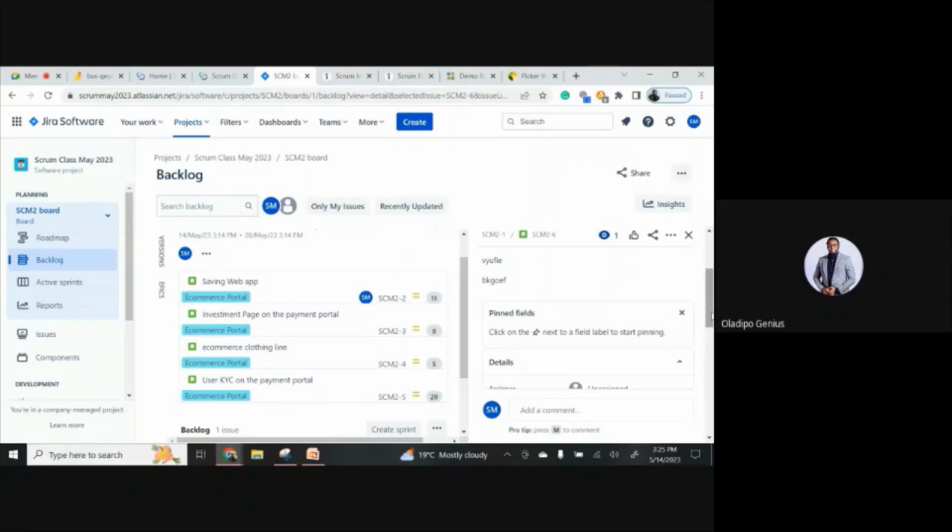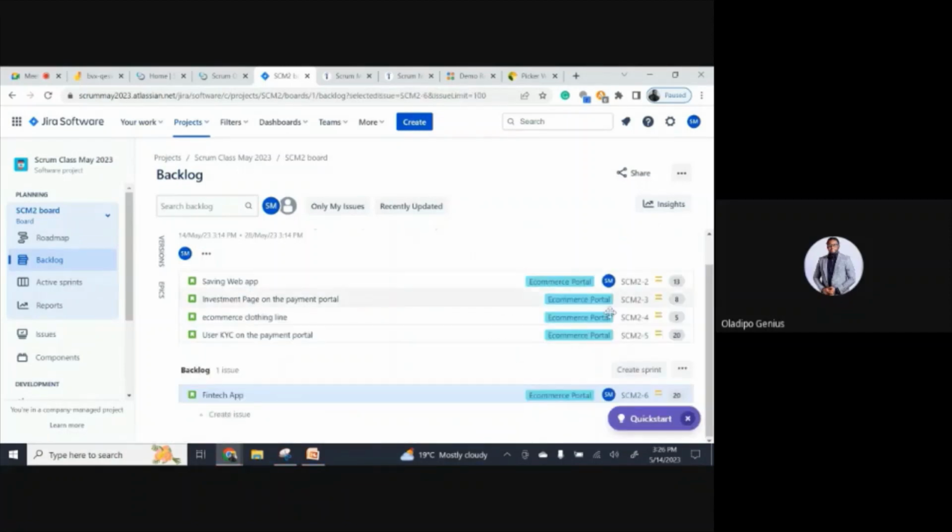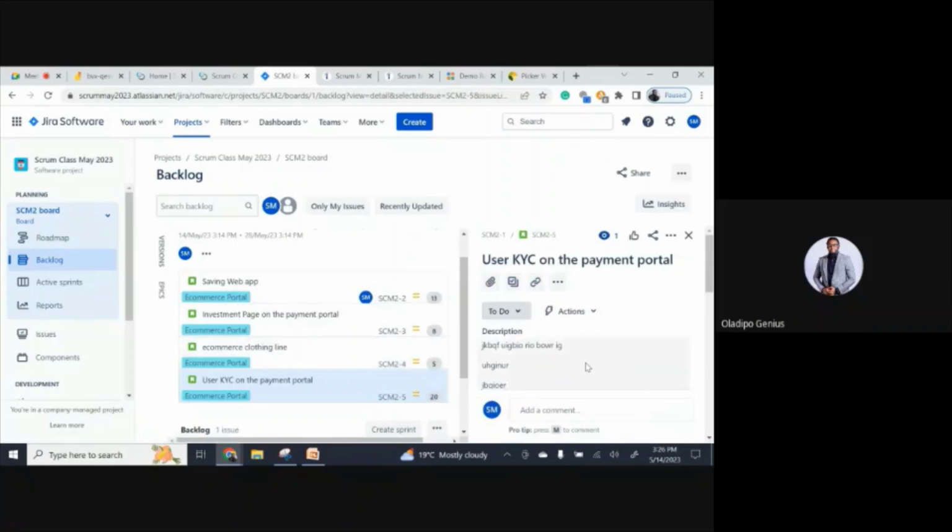It is better to ask the developers, because truly the developers have various skill sets for various things. Somebody might be good with web applications, somebody might be good with mobile applications. They're all skilled in different ways. So it's best to ask, okay, so what do we assign this to? All right, they say, okay, Kevin should do this one. Kevin has skills doing this, or he has done something like that before. So you assign it to Kevin and you do that assignment during your sprint planning.